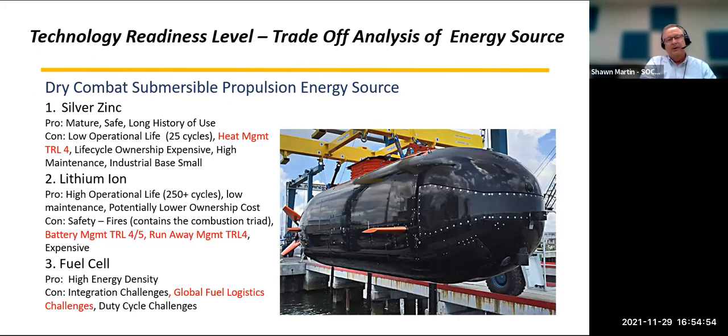The fuel cells lost out pretty quickly in trade-off analysis, mainly because of the global fuel logistics challenge. How are you going to refuel the thing across the world, as mobile as it needed to be? So we said, it's a little too hard to do. We put money into both solutions 1 and 2, trying to progress their maturity.